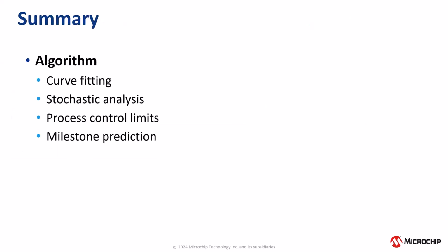So let's recap what we discussed. First of all, the FPGA was a very large semiconductor die with a large number of milestones. The schedule planning was very complex and would take a large amount of effort and time, so we needed an alternative method to control the schedule and predict key milestones. The method was to change from the normal time domain type analysis to a newer method that used the number of open major milestones as a function of time.